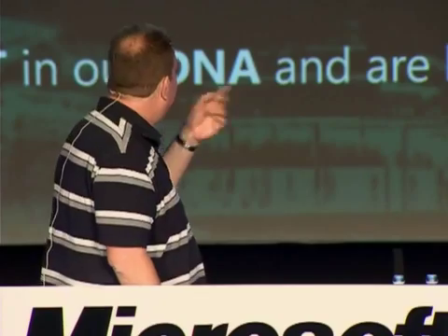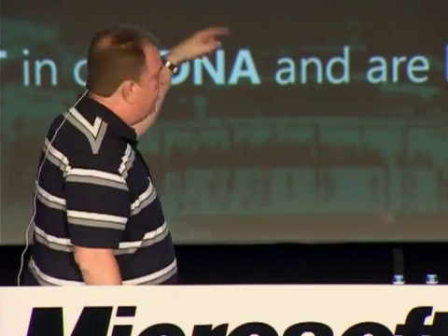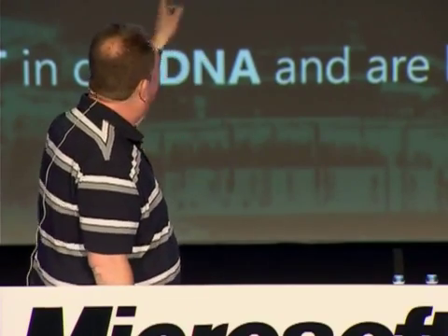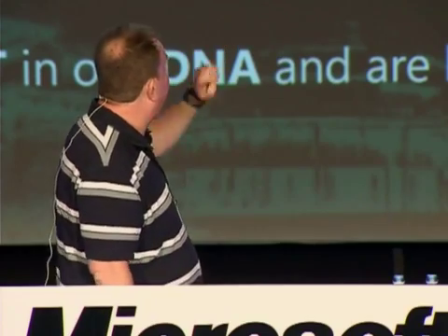It looks really simple here and really clean, intentionally. That model there wouldn't allow you to go from tests back into the backlog. There's no transition allowed. In the real process template, you'd have to put transitions in between each state where the person's allowed to change it. And I've seen it before where you have a transition between every state. You allow people to move things about. That gives you the flexibility of the wall, because there's nothing stopping me moving my sticky note anywhere. But again, for simplicity's sake, I've kept it like that for this demo.